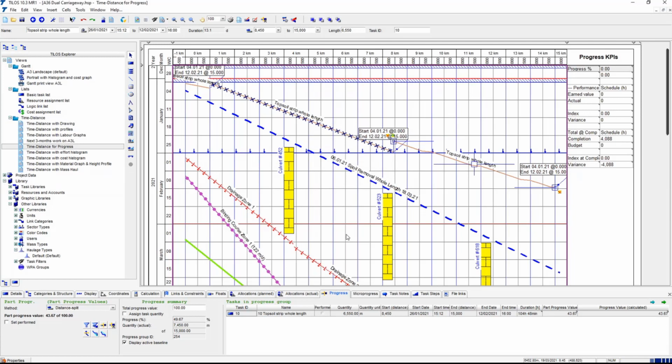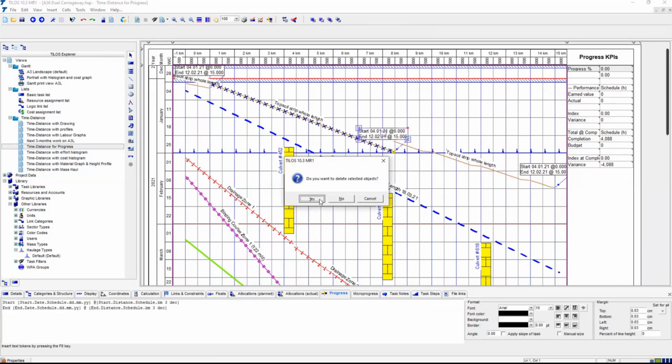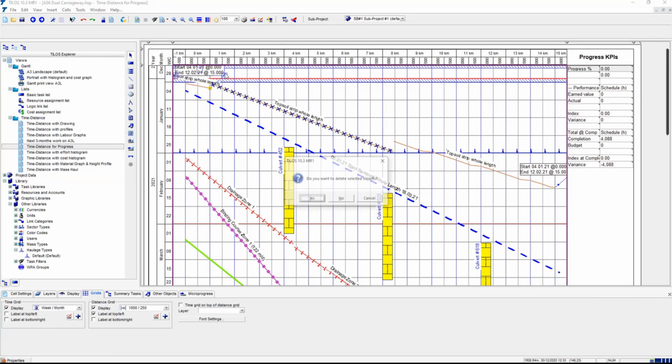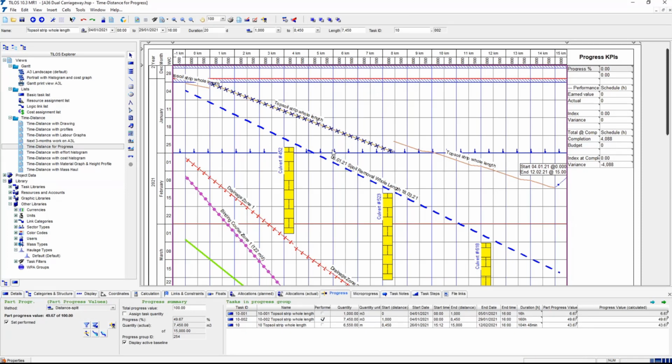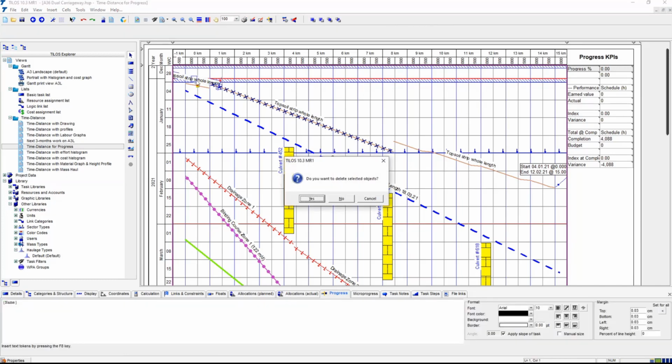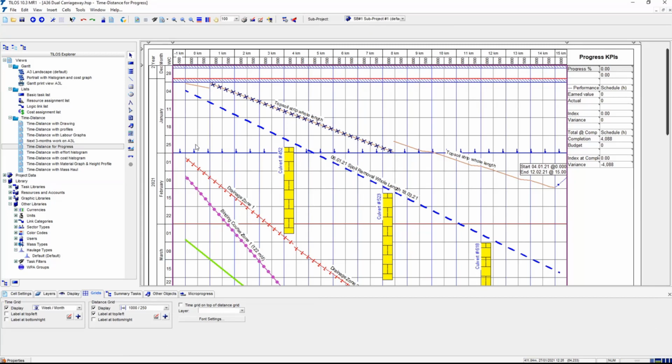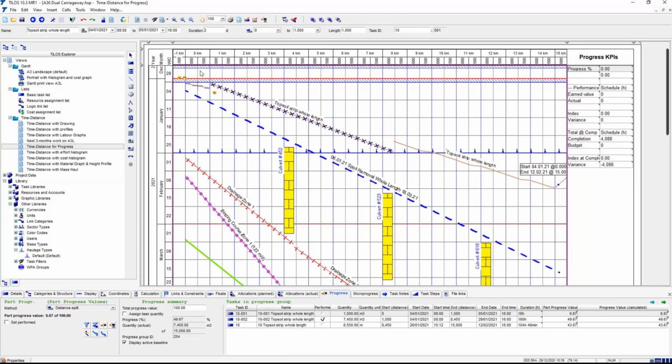So we can break out the bit that's been done, and I forgot to adjust what happens to the annotations at that point. So they get cloned, but I generally don't want them to be cloned. So those activities that are completed, I'm showing as being crossed out. There's various ways of demonstrating progress, but it is a slightly tricky subject on a time distance diagram. So we can do a sort of highlighter pen background, or so I've got a bit of the task here that hasn't been done.